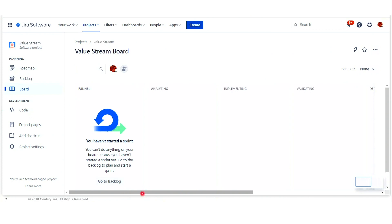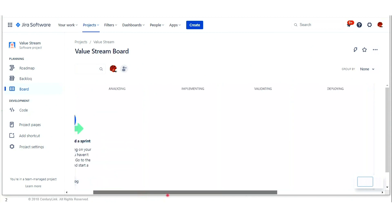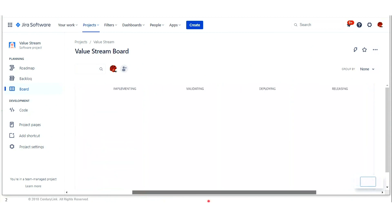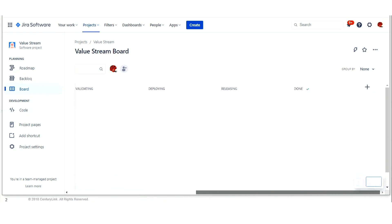At the capability level, there are now seven steps along the workflow. Funnel, reviewing, analyzing, implementing, validating, deploying, releasing, and done.